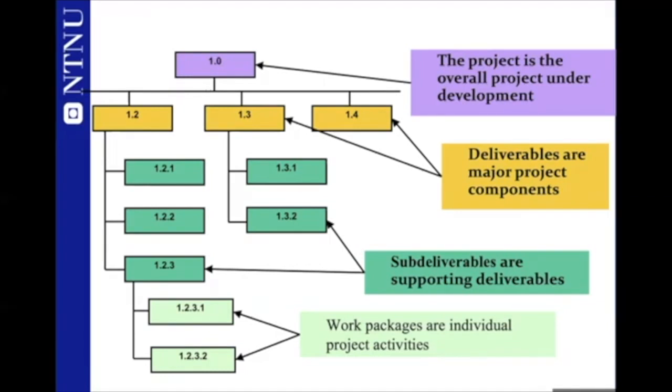And then you break down this project into major components. These are, let's say, major milestones or major contracts. These are huge deliverables. For instance, just as an example, if you are working on software development, you could say that one work package is finding the requirements. The second work package is developing the requirements. And the third work package is the implementation of the software. And the fourth work package is perhaps hardware procurement. And this last work package is integration and testing. So these are major components.